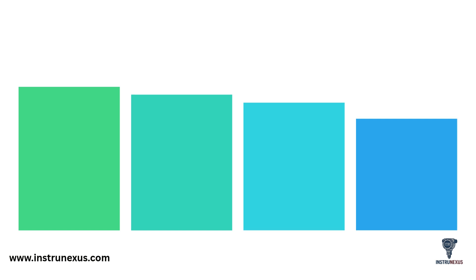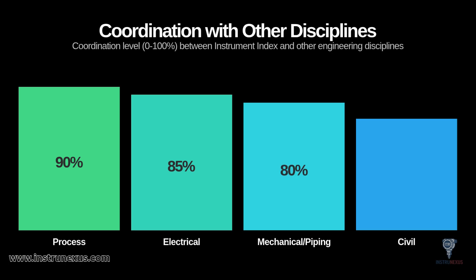The instrument index lives or dies by its coordination with other disciplines — it is not an isolated document. As this chart shows, the required level of coordination is extremely high. You have a 90% coordination level with the process team to get all the service descriptions and process data correct. You have an 85% coordination level with the electrical team for power supplies, cable data, and load lists. You're at 80% with the mechanical team for connection types, line information, and wetted materials. And even a 70% level with the civil team for things like location and mounting. It truly is a central hub document.